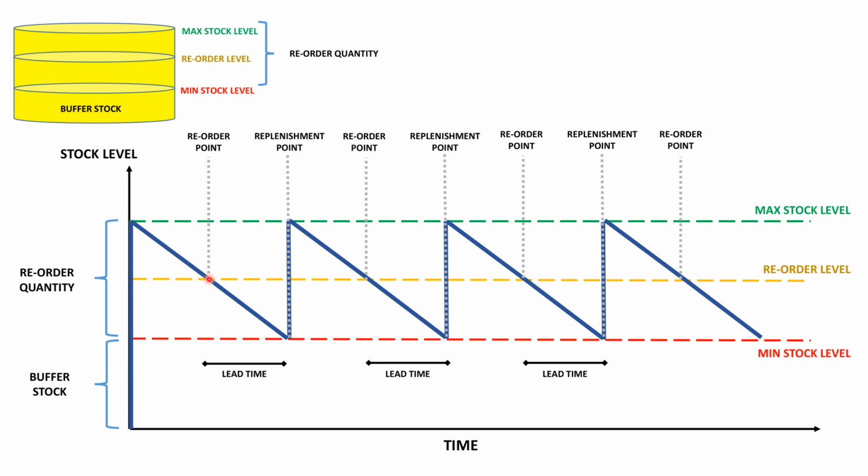Once we have issued a new purchase order, the work continues without stopping and it reaches the minimum stock level. As soon as the stock reaches the minimum stock level, the reorder arrives at the site and the stock is filled again, and this cycle continues throughout the life cycle of the project.